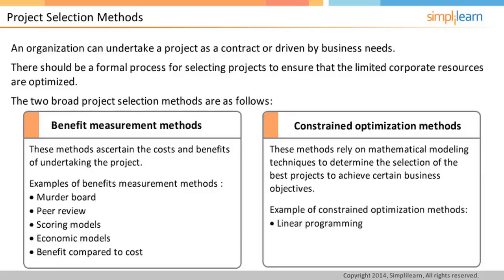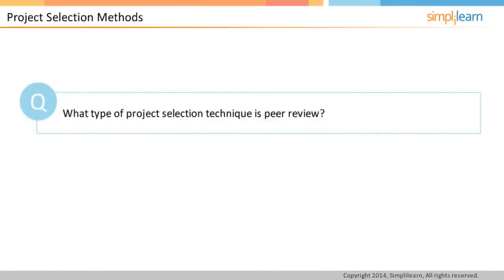In reality, you might not have seen these methods followed in project selection. Often, personal relationship with the sponsor may be more important than anything else. This is quite normal and any organization worldwide works this way. However, as a certified project manager, it is important for you to be familiar with more scientific methods of project selection. A typical question on the PMP exam could be: what type of project selection technique is peer review? And the right answer is benefit measurement method.